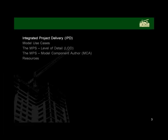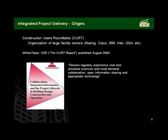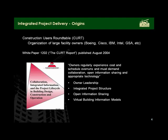The first piece is integrated project delivery. This was really kicked off by the Construction Users Roundtable, an organization of large facilities owners. In 2004, they published White Paper 1202, which became known as the CURT Report because of the far-reaching impact it had on the industry. The main conclusion was that owners regularly experience cost and schedule overruns. The report boiled down to four points, the first being owner leadership — that owners should really take some leadership in how projects were put together.